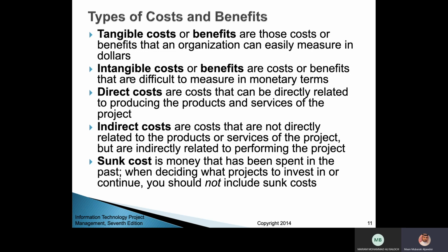You hire someone. This will cost you some money to look into the market, the demand, people's preferences, and other aspects of the market. These things will cost money. Now, this cost is not included in the project cost, but it is a cost. So we call it the sunk cost.